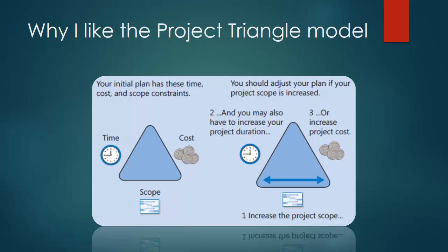There are other cases, though, where I think this really applies. So sometimes scope creep is legitimate scope creep. We thought we were going to deliver A, but along the way of doing that, we really decided we needed to deliver A plus B because the external environment changed, or competitors came out with something better than A, or any number of reasons.